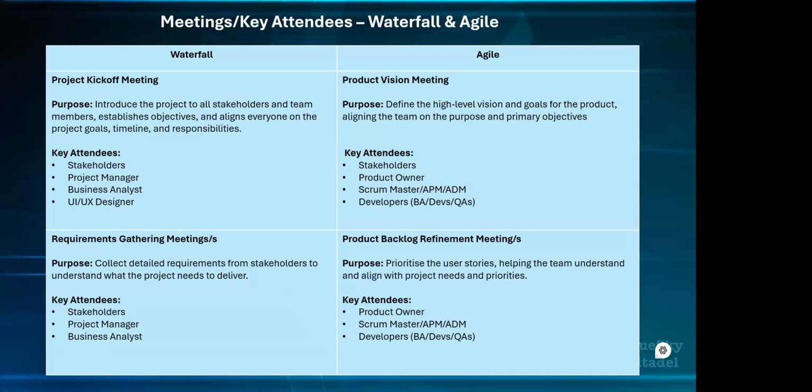So imagine if your developers and all that are not at the requirement gathering stage. This is where they get an understanding of that project, of what is expected, what is the ask for that project. So they brainstorm, they prioritize the stories, they estimate the effort. Clarity is provided by the PO or the BA if they have a BA for that team. So clarity is provided, and the outcome is to have an initial backlog containing prioritized stories. Now, the stories are not just titles, they have all the description, acceptance criteria, what needs to be done, at times wireframes to guide the developers and the QAs. All those are listed there.